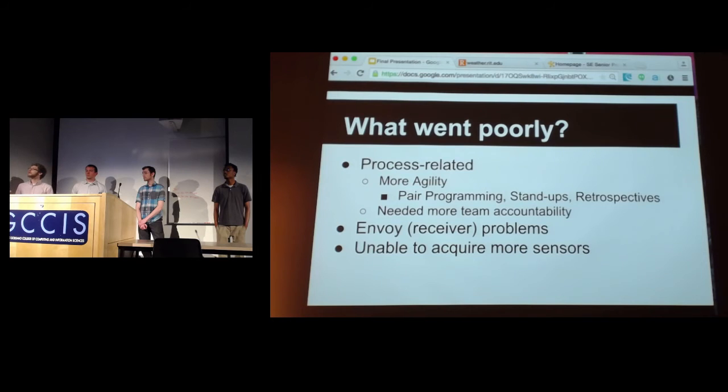And another aspect is daily stand-ups. We could have utilized those more, so that way in our long stretches of implementation there was less gray area between the team, and we could have avoided doing some tasks late and things like that. And retrospectives, we had really useful retrospectives, but we didn't translate those properly to actionable things to do afterwards and how to address those things that we talked about. So if we'd done that more in the semester switch, we probably could have gotten even more stretch goals in at the end of the day.